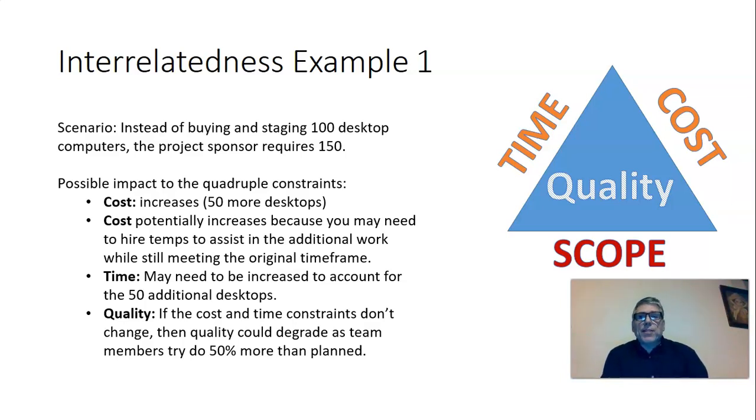So you might have the team members volunteer to say, okay, we'll put in a couple hours extra every day, we'll work weekends, we'll get this done. But as often happens, as people put in more overtime and more hours, you may find that the quality of the work degrades as people try to do more within that same amount of time.